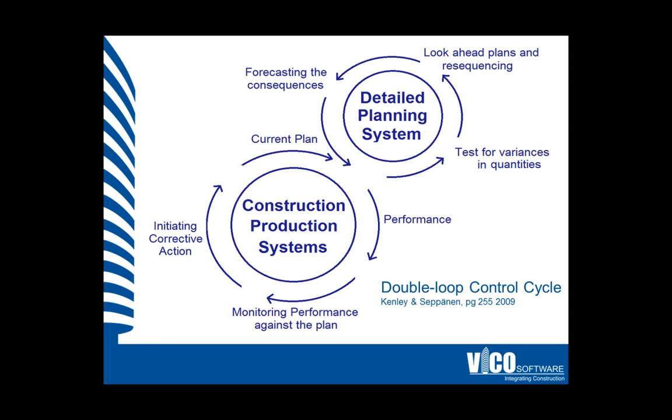The overall planned production rates and start and finish dates of trade packages should be reliable because they are used in the procurement process. The task of production management is therefore to find solutions to production deviations.